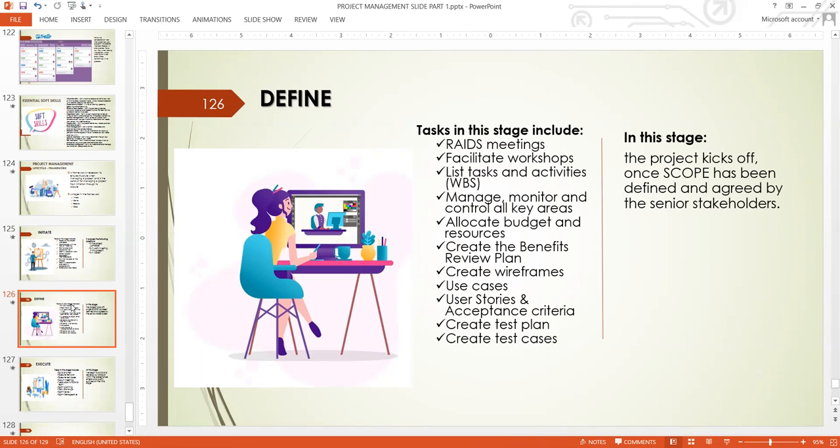If you are using a waterfall approach, you have to be having regular meetings. But if you are using an agile approach, you will be having your daily stand-up every day. This helps you to look at risks involved, and you need to be having your retrospectives after every sprint.